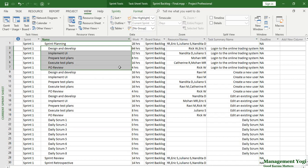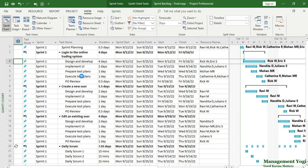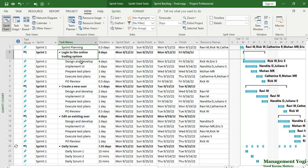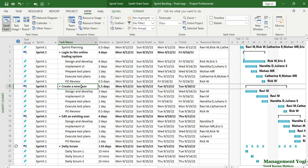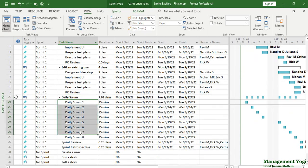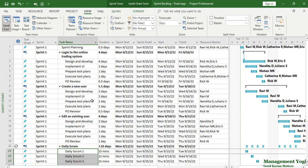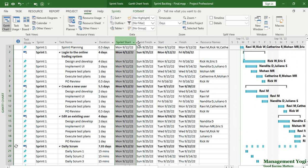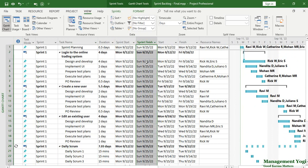You can go to the Gantt Chart view, which is a very useful view. It gives you the summary task as well as subtasks — for example, the feature item 'Login to the Trading System' with its subtasks. Similarly, 'Create a New User' is another feature. Daily Scrum is a recurring task — we have eight daily scrums because it is a two-week sprint. You can create a custom filter, but this view already shows you sprint start and sprint finish columns, horizontal bars, and dependencies if any.